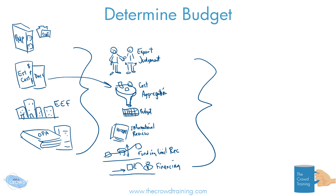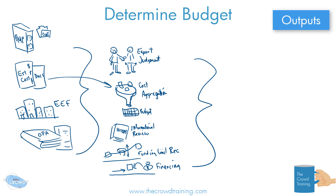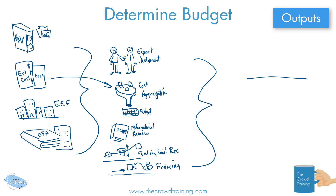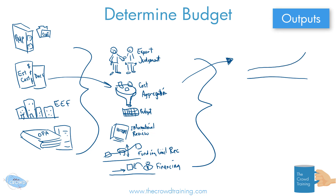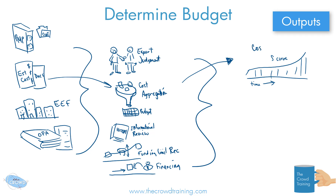Now let's look at the outputs. The budget here in the PMP and PMBOK is laid out in a certain manner over time to show how costs are expected to be spent, and it typically follows an S-curve kind of look. Really what this is, is our cost baseline, which we use to help us monitor and compare our progress throughout the project — to see if we are on track or if there are variances, and to gauge how our project is performing in terms of costs.